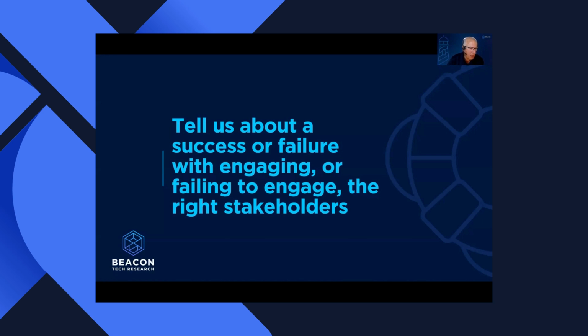At a 501c3, we engaged the board to a degree that caused issues. They weren't the end users and didn't understand the operations, so they ended up choosing a system that looked nice but didn't work well for the staff. So when we ask you to engage board members or executives, make sure you engage them in the areas that are of interest to them, not in everything. They don't need to be engaged in what the frontline staff subject matter experts are telling you that they need at the front line. That will be a recipe for disaster, and I apologize for not clarifying that earlier.